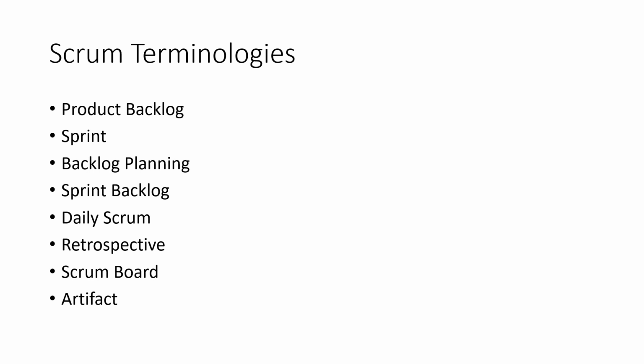Daily Scrum. A Scrum project team meets every day to discuss progress over the last 24 hours, progress expected in the next 24 hours and any new problems. These meetings are typically referred to as daily scrum or daily stand-up and generally take about 15 minutes.